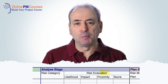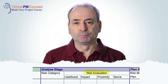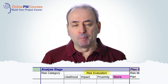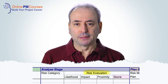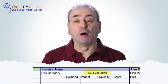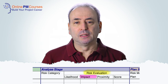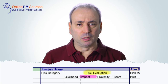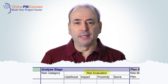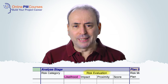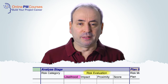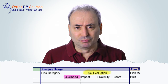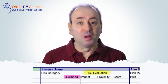Next and crucially is some form of evaluation of the risk. You may just have a single field with high, medium or low, but you may want something more sophisticated. The main components of risk evaluation are firstly impact — a numerical assessment or a high, medium, low type of assessment. The next thing is some form of likelihood. Unless you really know what you're doing with statistics and probability theory, keep this simple: high, medium and low, or possibly very high, high, medium, low and very low.